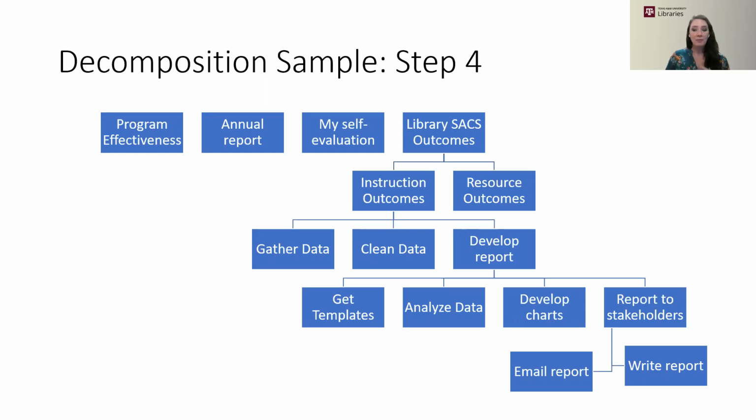The point at which you stop breaking down project activities is very subjective to you. They say that you should do it when you reach a unit of work. Again, very subjective. There are some people that say about 8 hours of work for one person, you can call that a unit of work. So if it's just a day's work or less for just one person, you can stop decomposing. But if you've got multiple people to assign something to, maybe continue breaking it down. And once you have every part of a project broken down into these units of work, this becomes a very well-defined project. Imagine that I did that for every element of each of my deliverables, and I have very much defined the activities of the project that I need to do.